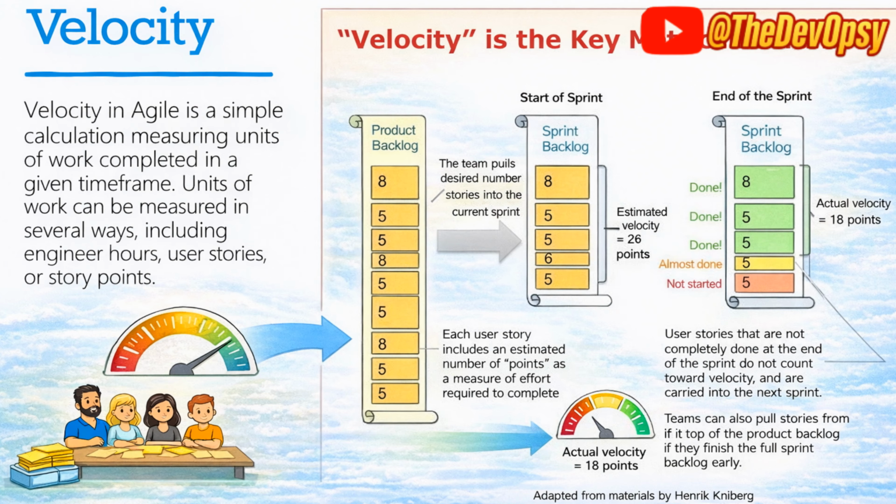And when you end the sprint, last time somebody asked me a question: what happens if we are not able to achieve it? Yes, that might happen. There are a few things which did not even get started. So that will certainly go into the next sprint. Or if you have already completed all those items, you can pull new items from the product backlog. If you have completed something and you still have points, you can get new items from the product backlog which fit in your sprint.